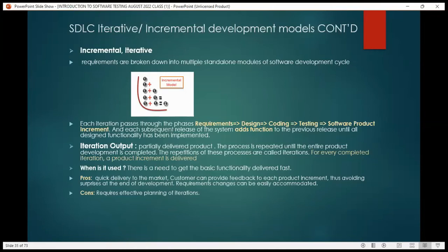Naturally, when you're working with teams of developers, our expectation as testers is always either the ratio of 2-1 or 3-1. So I mean 3 developers, 1 tester. Very good. 2 developers, 1 tester. But when you're having 4 to 6 developers and 1 tester, then there is a problem because you'll be overloaded and you might not be able to give your best shot when it comes to testing at different cycles. So you need to know what and what. There are ratios to each of these.